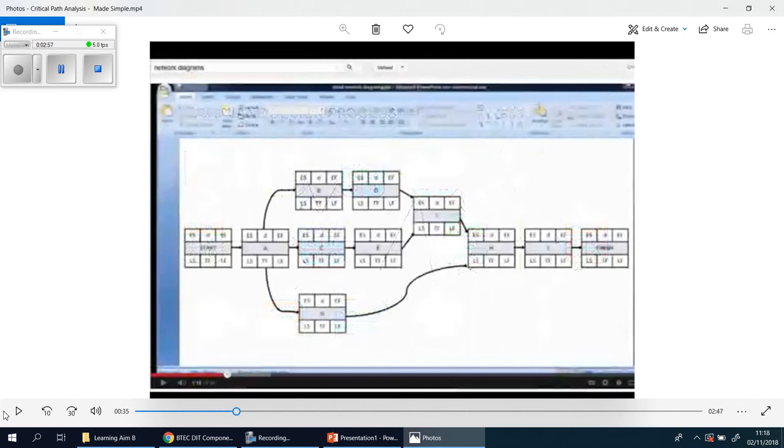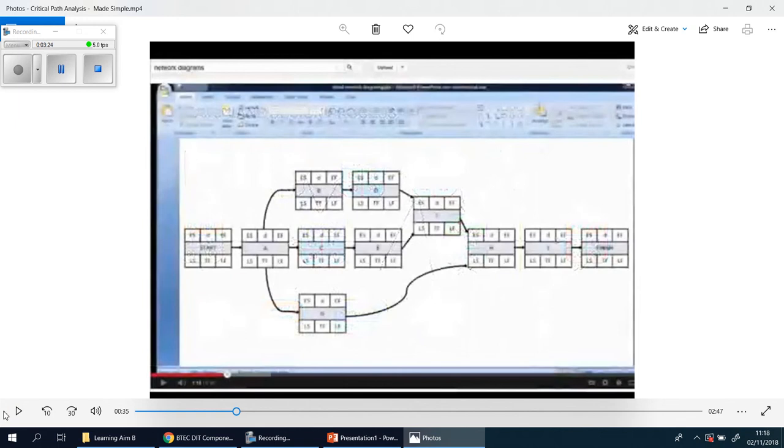Your longest route in this critical path diagram is the shortest time that you have, because think about it: you want to find the longest path from start to end because that's how long it will take as a bare minimum to finish everything. Your longest path is the shortest time that you can come back to the manager with. Hopefully that will make more sense when you see his example, which is simpler than the one you'll do.